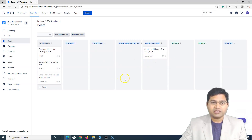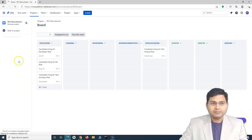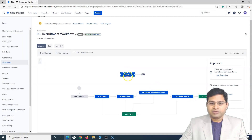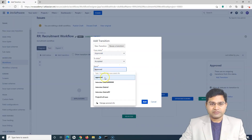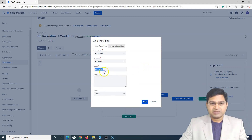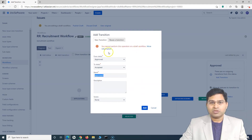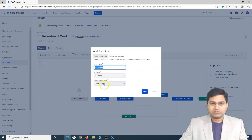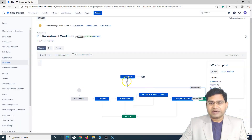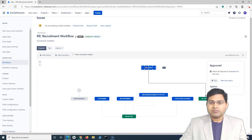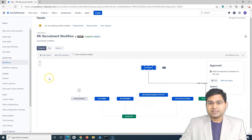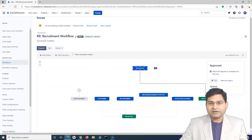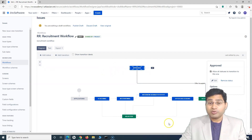One more thing: if I go to the project settings again, go to workflows, and edit the workflow, and try to add a new transition — say, from 'Approved' to 'Accepted' — and name it 'Approve One' and add it, you'll see that it won't allow you to do it. However, reusing an existing transition such as 'Offer Accepted' will be allowed. So there are limitations on the transitions and statuses you can create directly in the draft workflow within project settings.